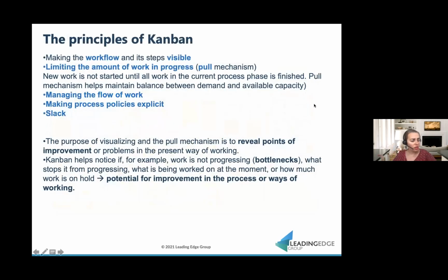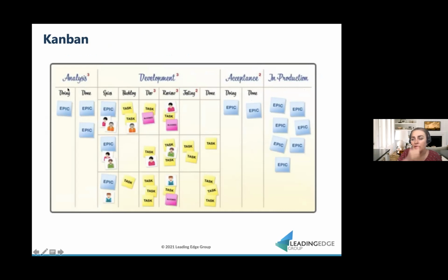And there are some rules and regulations around the Kanban board. So just going back, in Scrum, the definition of done would guard the quality. Here we would have policy lines. So we would discuss at the team level what needs to happen for the work to move from one line to the other line. So we know that A, B, and C need to be done before, for example, we move it to review. And then once review has passed and there are no comments, 1, 2, 3, only then the work can move to the next line. So those regulations are called policy lines.